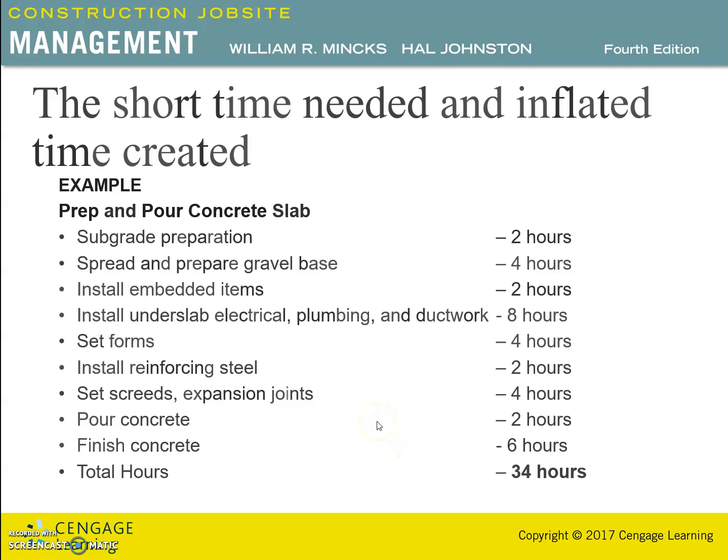In most construction schedules, activity duration should not be shorter than 1 day. Well, there are certain situations, such as a plant shutdown for a short term repair or for additions, that must be scheduled in small increments such as hours. A guideline can be established for activity duration such as between 2 and 20 working days, but this should not totally eliminate necessary activities that are shorter or longer. So the recommendation is that most of the activities should be between 2 and 20 working days.